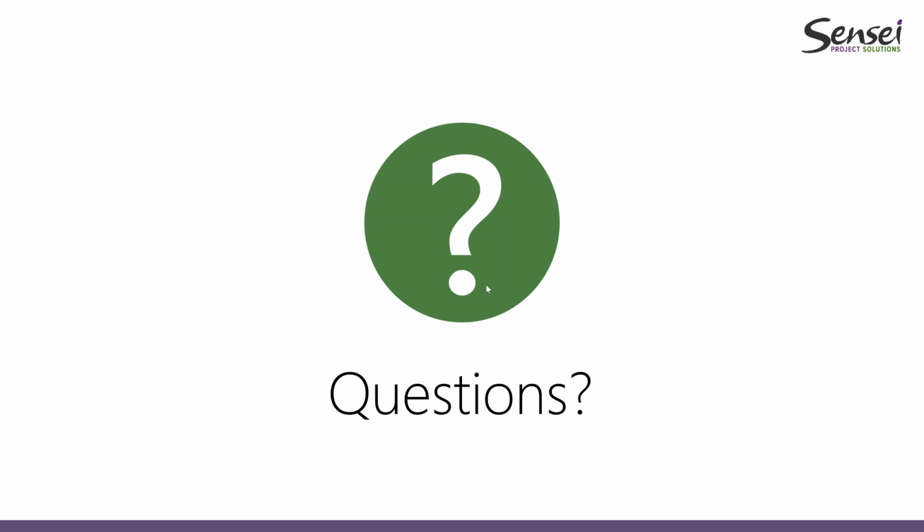Allison is asking if we have to have Microsoft Access installed on our machines in order to create the MDB file, and the answer is no, you don't. You need to say that the file is going to be an Access database, but you definitely do not need to have Access installed on your computer. Access would only be required if you'd like to open the database and do something else with it. But since Microsoft Excel is going to be the tool that's consuming data, you just need Excel and Project. You don't need Access.